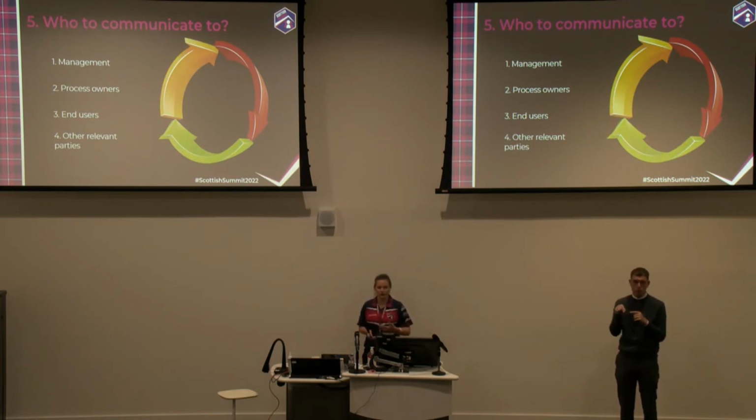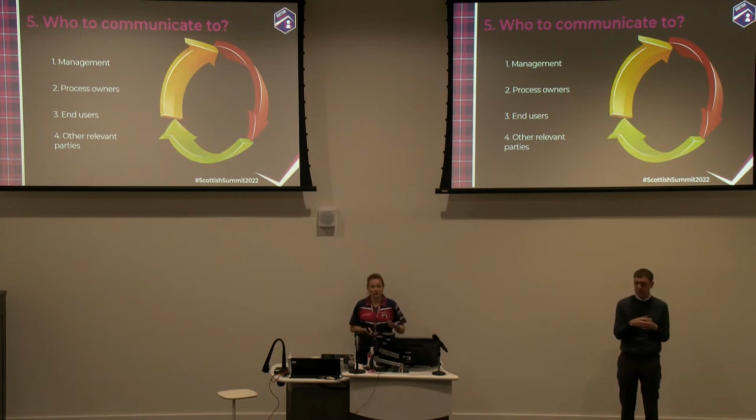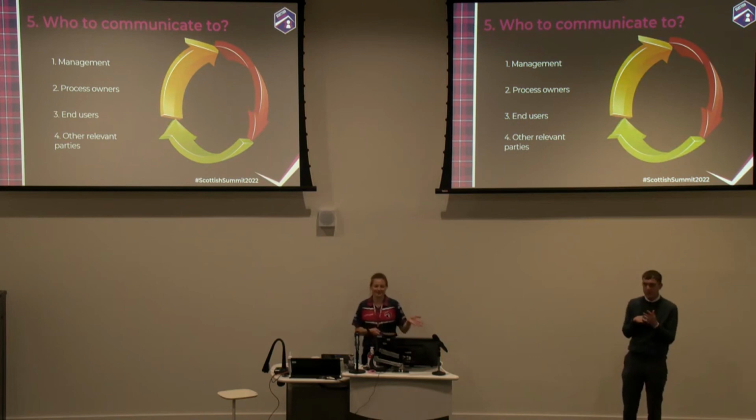What we did was we actually created a newsletter. We created a weekly newsletter where we brought out the different parts that we were working at, the different areas. The fact that CRM wasn't actually that widespread in the company, we actually took the chance of using it as inspiration of how you can use CRM in different departments. And that newsletter is actually continuing on after the upgrading project, because people were first figuring out what CRM was in different departments that they had never heard of. There were tools, there were processes, there were ways of doing things in CRM that they were doing manually in Excel.